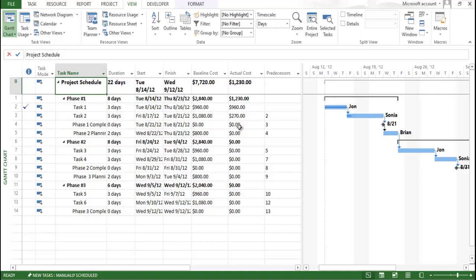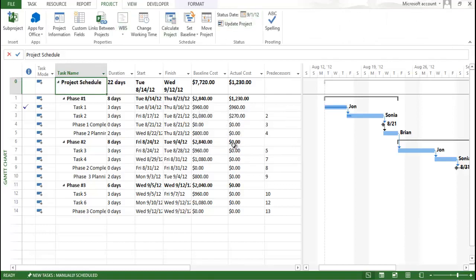That 110 rupees is the actual cost. But earned value has a very different definition. Earned value is a concept where we look at cost with respect to task progress. In project management, when calculating earned value, you need to assign the baseline, then update the project at a particular date. Without a status date and project update, you cannot perform earned value analysis. Go to Project, set the status date, update the project, and click OK.